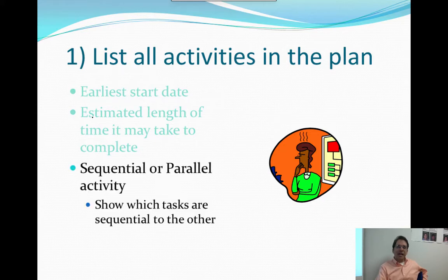And then decide which of your tasks are sequential or parallel, so you can kind of condense your project and get it done as quickly as possible. So you want to try and group as many parallel projects as you can, so that way everybody always has something to do. So we decided, like, advertising for our chicken coop, that's a task. So if you're doing your chart and then you realize, oh, well, there's only 2 people can paint at a time and there's really nothing else to be done at that time. So all my other people, I'm going to have them start advertising. I'm going to have them start taking pictures of the project, kind of logging the progress of it, things like that.